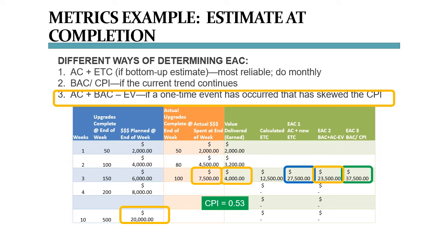One of the things we're seeing, though, is that no matter how you calculate it, your project forecast shows that you will be over budget at the end. And it may be change request time to get your budget at completion adjusted to your new EAC and to get the financial baseline updated. However, before you submit that change request, really verify that this is the correct math and do your risk management here. You will want this new EAC to be reliable and robust enough for you to come in within 5% in future forecasts and during project closure.